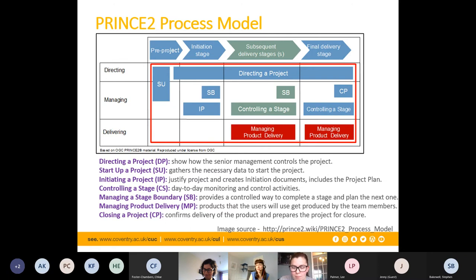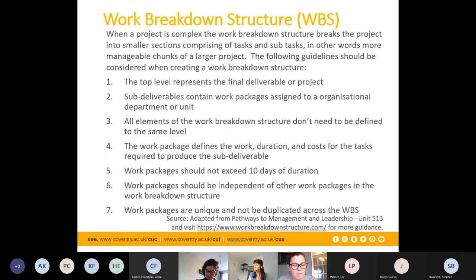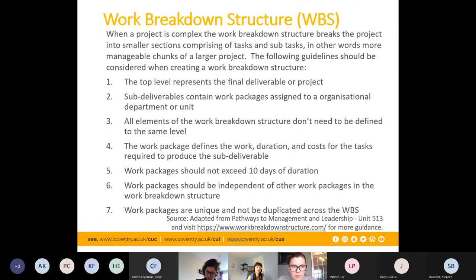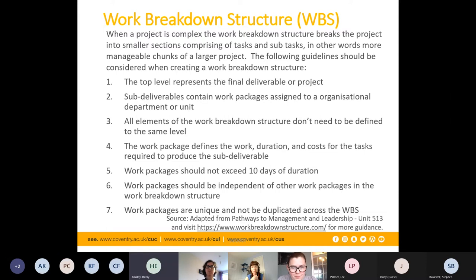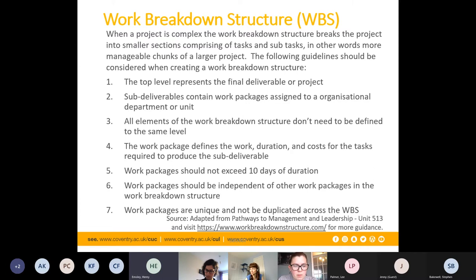A work breakdown structure is basically the first step in developing a schedule. It gives all the information needed by planners, agents, or engineers to produce Gantt charts or programmes. It should outline everything needed to accomplish the project — tasks — in an easy-to-understand chart readable by anyone. It details the work to be executed by the project team to accomplish project objectives and can break the project down into phases, deliverables, and work packages.